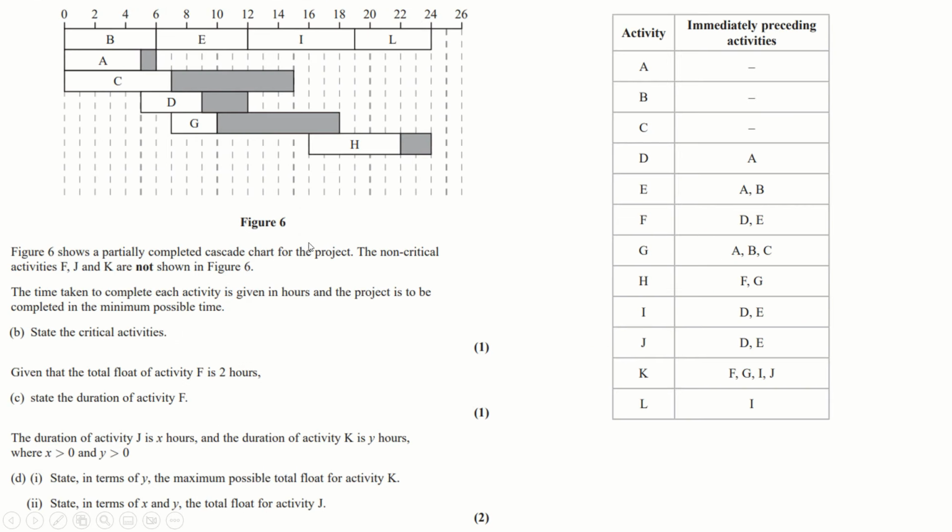Not so much in PowerPoint, but with pen and pencil, finding some areas is good. Anyway, B, E, I, L are obviously the critical activities. It's the ones that have no float time. The float time of F is 2 hours. State the duration of F.